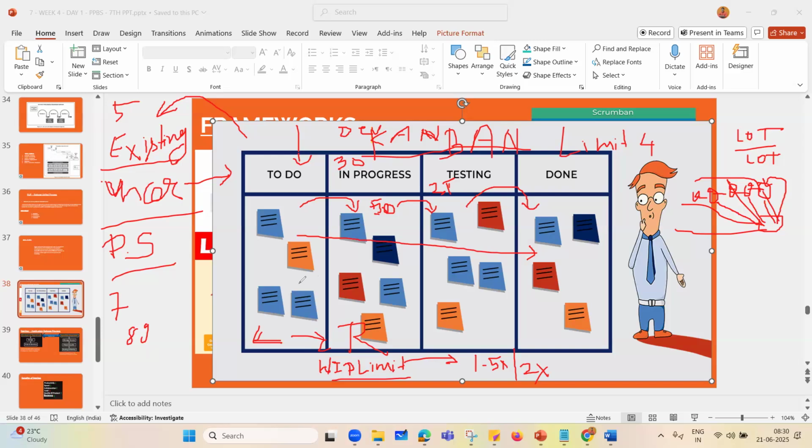So when you are pushing the task, meaning you are giving the assignment, it is called a push-based mechanism. What is it called? Push. You are pushing the task. But Kanban says, hey, don't push. Make it pull-based. Pull-based means let the team pull their tasks on their name and continue to deliver. So Kanban supports what type of mechanism? Pull-based mechanism. Why? Because if I have a jar, I ask everyone, hey, come one by one, just pull your task and go back. Or I can keep the jar and instruct, okay, go ahead at your ease, pull the tennis ball and start juggling.